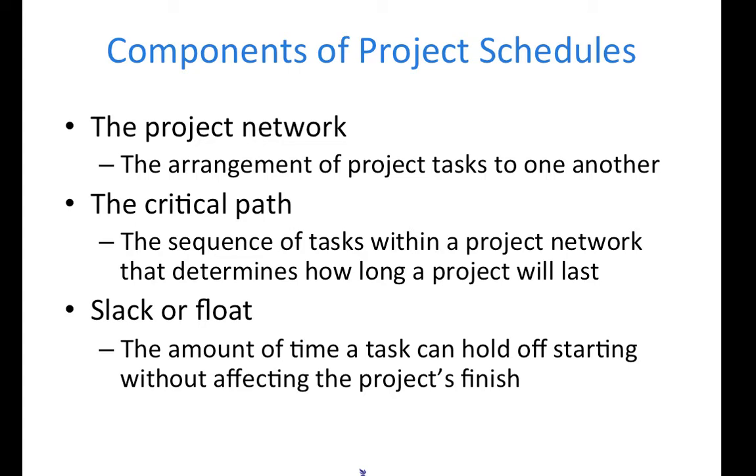Often resources are taken from activities off the critical path to shorten the path. This happens by adding resources and shortening time to do the tasks, or to keep the project on schedule when it has fallen behind. When this is done, you have to be very careful that the tasks losing resources do not now take so long that they become critical and the new critical path.